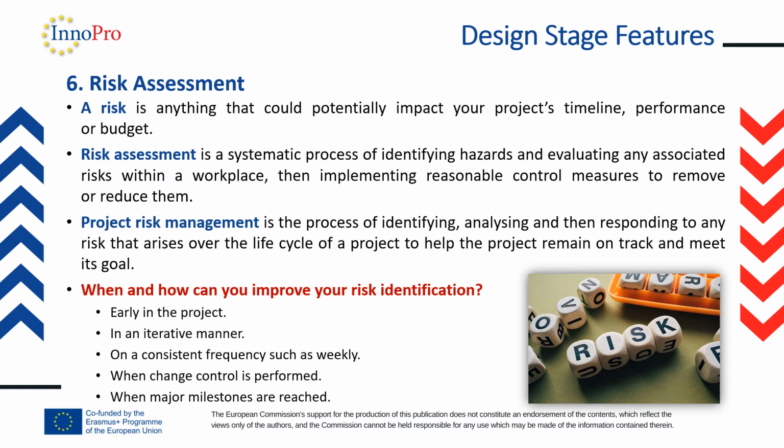And some hopefully helpful remarks for our risk identification. When or who can do it? Well, the risk identification should start with project risk management as early as possible, and in an iterative manner at a consistent frequency, for example, weekly or monthly, of course depending on how long your project is. And of course, it is necessary to look at changes in our performance, and also at the way our major milestones are reached.